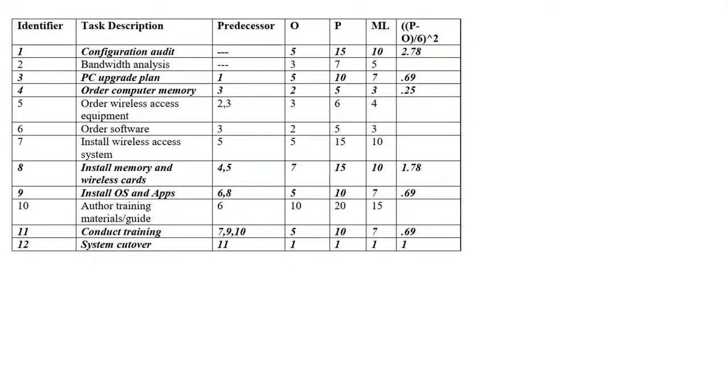You could ask, why do you need to do that? Recall that PERT analysis is not just about doing a 3-point average. You're doing this so you can have the project mean, which is the 50% probability time of achieving that schedule, but also the standard deviation. And if you have the mean and the standard deviation, you can convert standard deviation to units of time to calculate what would be a 95% probability schedule, which is a better schedule to plan for than a 50% probability schedule, as you can imagine.